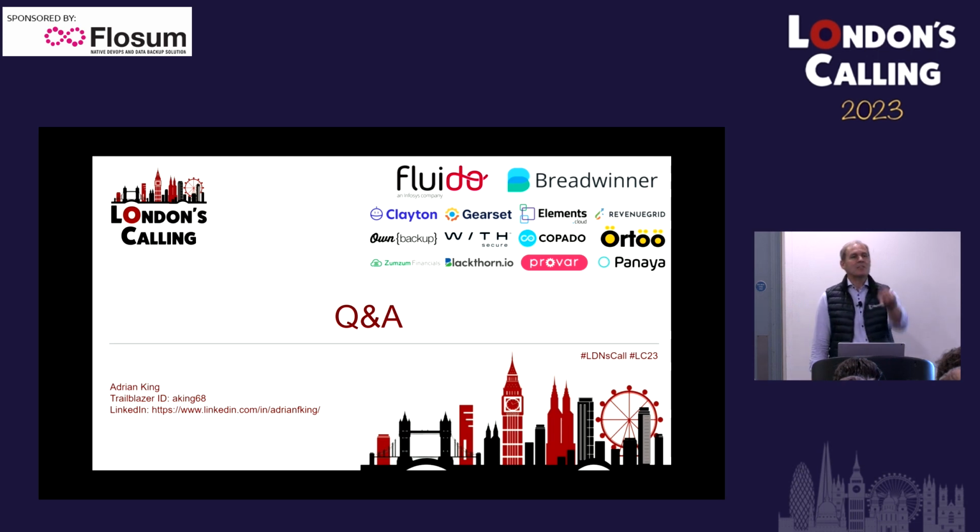And the interesting thing is actually the back of the room is my CRO, Richard, and quite a lot of requests for changes come through his team and from Richard. There are times when we will do the analysis and we go back and go, we now know how much this is going to cost to build. Is it worth it? And at the planning stage, we decide it's not actually worth doing a development because there isn't a return on investment really, and something's got a higher priority. And to me, that's a real win.